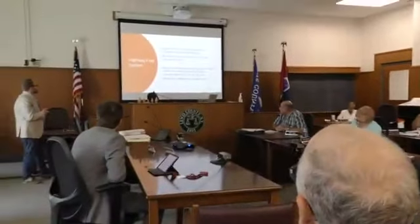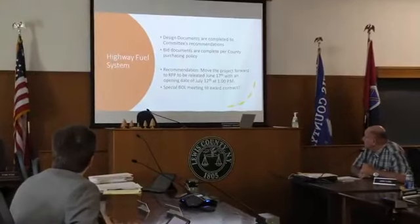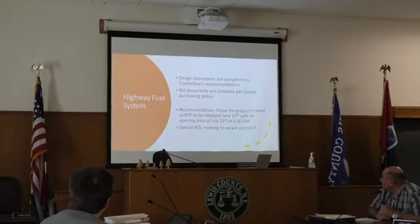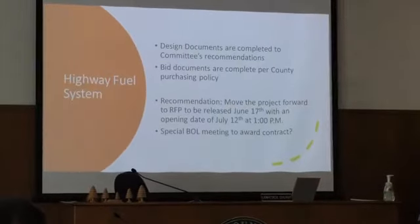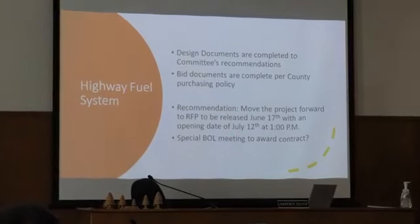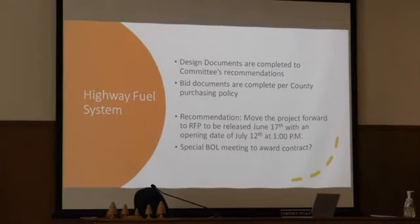I don't think so. We had talked about that, and I'll get on the phone right after this and talk to them. We want to get this thing done. Well, that's the next thing here: the design documents are complete to the specs that the committee asked, and the bid documents are complete for our purchasing policy. So we'd like to get this forward, hopefully let it out to bid this week. If we have to make those changes, say instead of getting out to bid tomorrow, we can get it out to bid Friday. That's still acceptable, but I wouldn't want to move our opening date too much because we have to keep this thing moving if we're going to get it done this year.